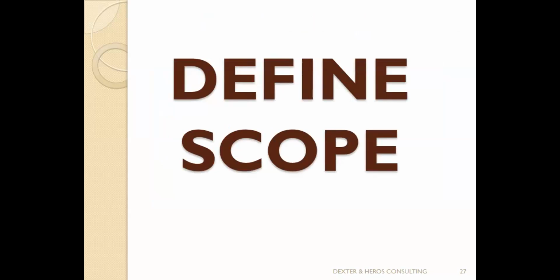Like I told us earlier today, in define scope, all you need to do is ask yourself: they say that it should have front and back camera. What are the works that I need to do to create those cameras? You begin to write the work down. They say the RAM should be not less than 8 gig. What work am I going to do to create that specification of RAM?